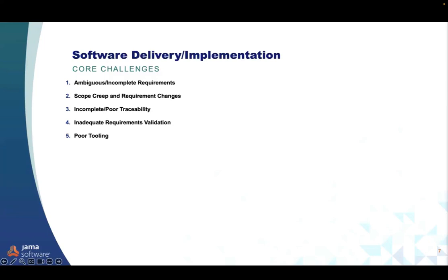Misunderstandings and misinterpretations. Unclear specifications can lead to different interpretations among different stakeholders. Each party may perceive requirements differently, leading to discrepancies in how the software should function or what features are essential for a deployment. This can result in implementation efforts being directed towards the wrong objectives, leading to rework and delays as discrepancies are discovered and corrected.